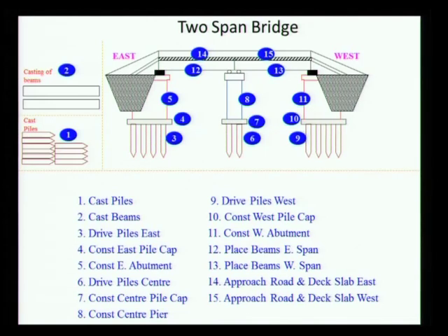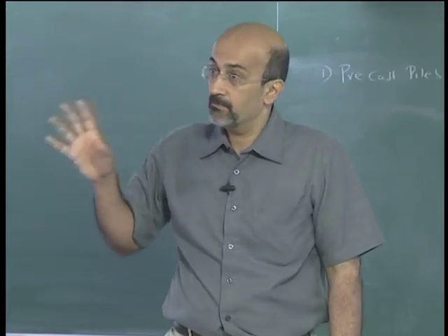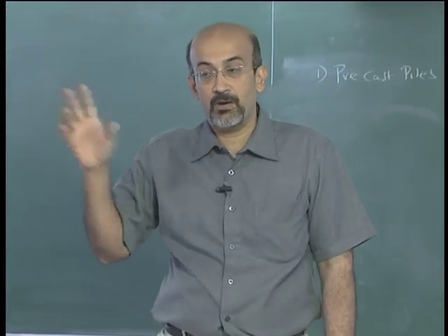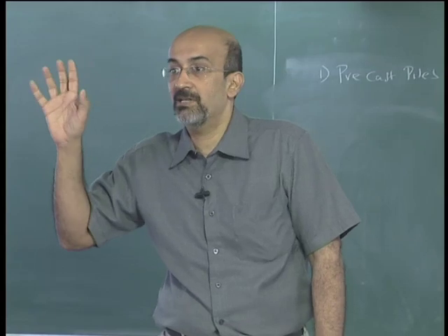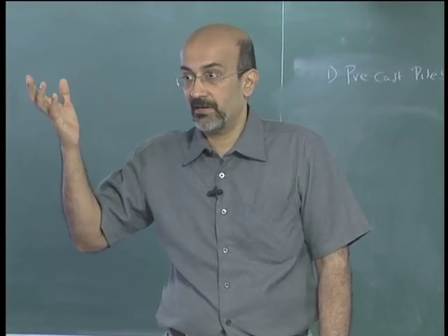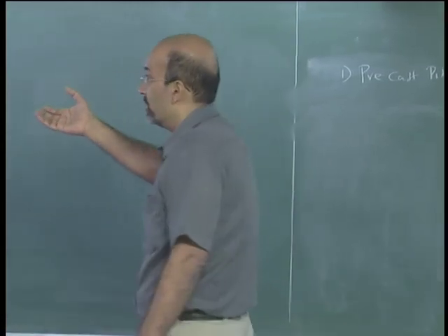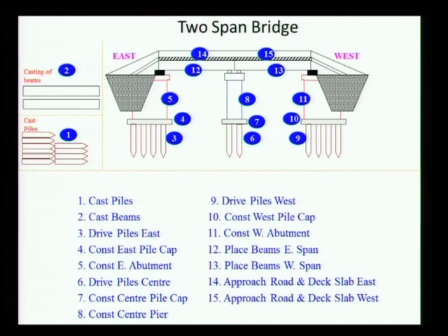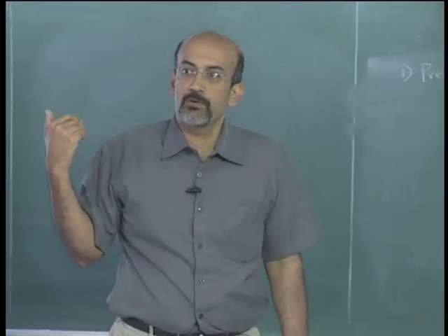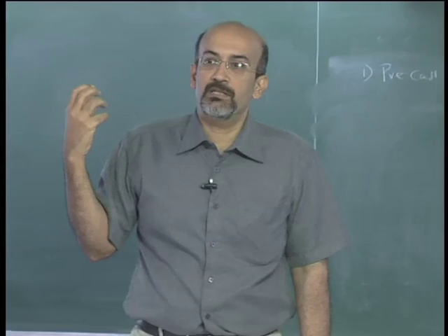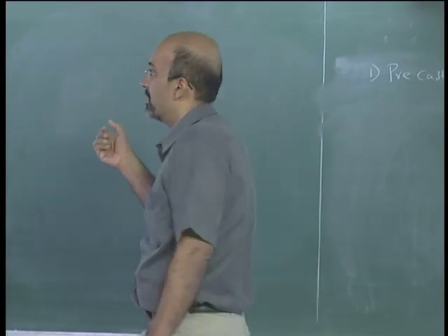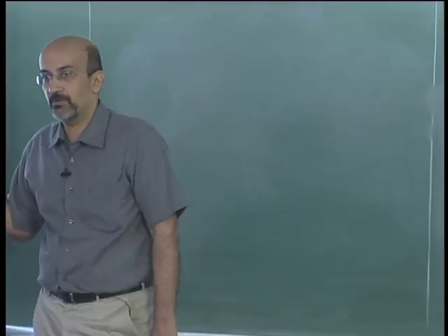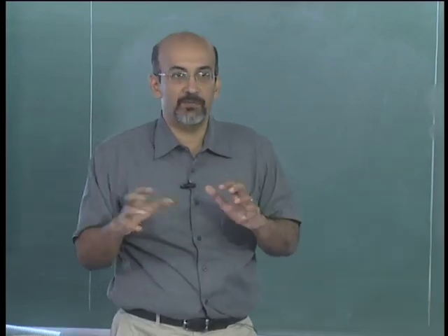Another structure could be, I can say, concreting. Or like we said earlier, I only say substructure work, superstructure work, just leave it at that. That's too abstract. This is one level of detail further. On what basis is this broken down? It's a component breakdown. We have taken the various components of the bridge and broken it down by component. Once we put all these components together, we have the bridge.